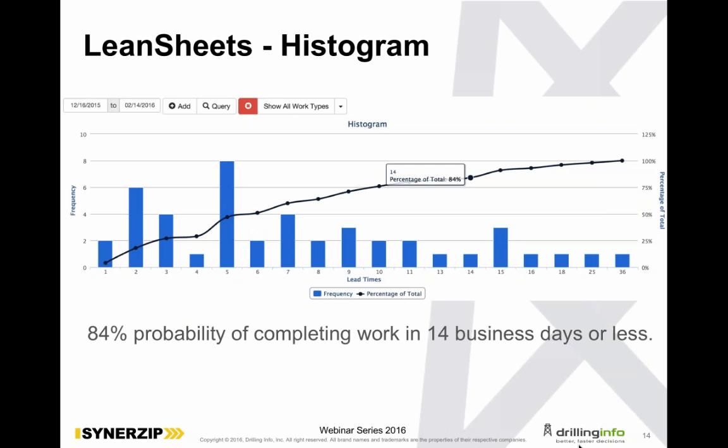And I've found points don't allow that to happen, but if a team wants to use points, I let them use it, but I track how long it actually takes. Looking at points versus lead time data like this, an 8-point story is all over the place. It could take 1 day, it could take up to 20 days, I've seen. So I like this chart much better to help do a more probabilistic approach than a deterministic approach.